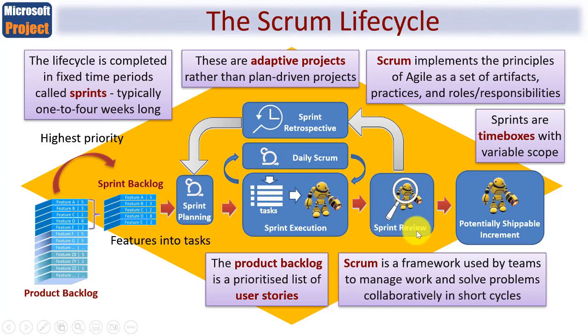Now, a sprint review is a bit of a demonstration, if you will, to show the customers and users what has been created. It's more than that, however, as we'll see later, but that's in essence what it's there to do. So the sprint review presents the completed products that have occurred during this current sprint. And any products that are demonstrated here must be, by definition, potentially shippable products or a potentially shippable increment, where an increment, of course, is one or more products that could be passed on to the customer.